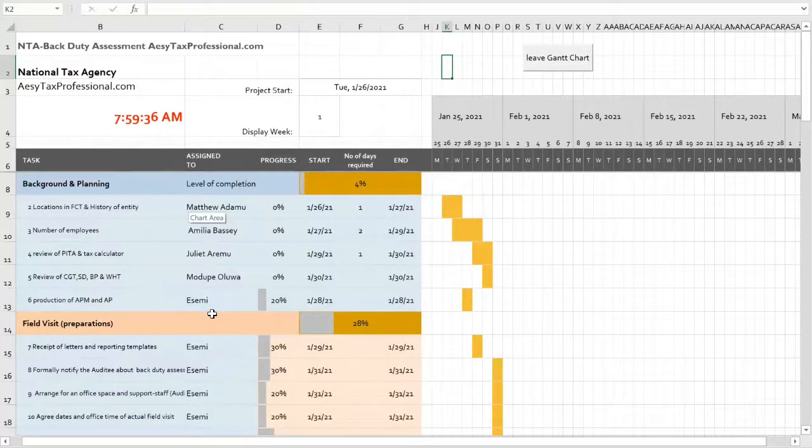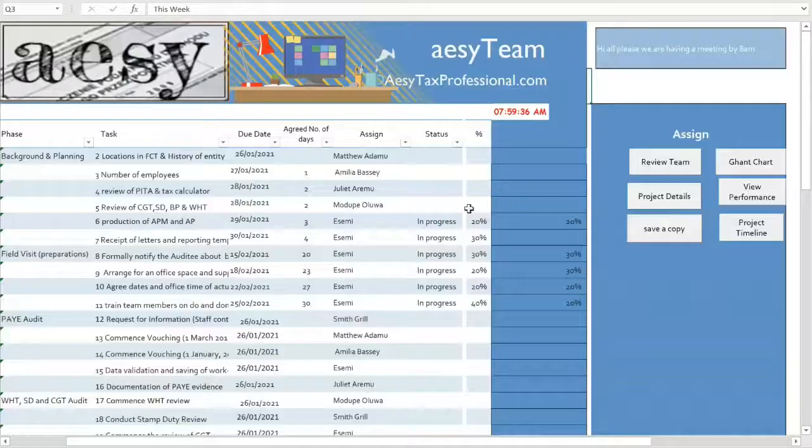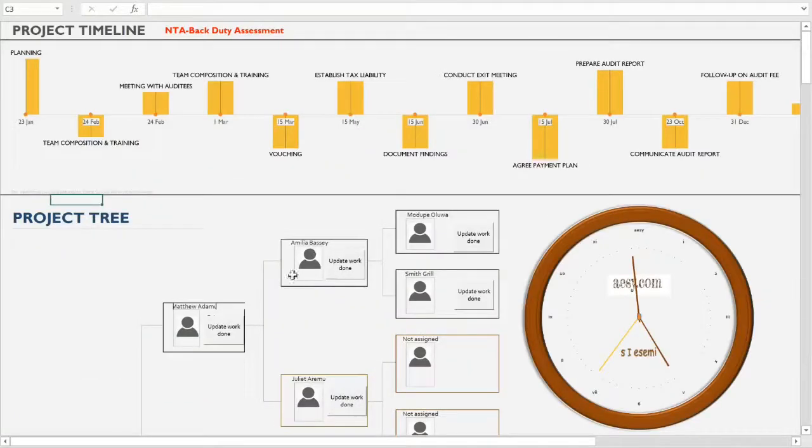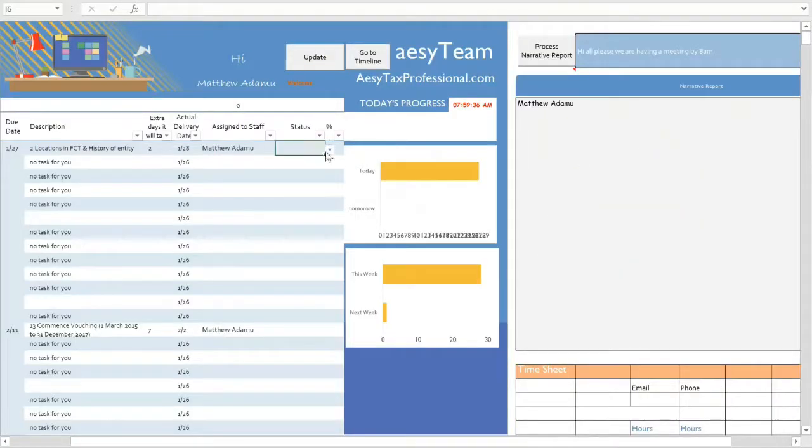As they report their performance in each of the sub-activities assigned to them, it goes to the Gantt chart and reports performance in each of the activities. It also goes to the main desktop of performance, and populates and shows you both graphically and otherwise how the project is improving.